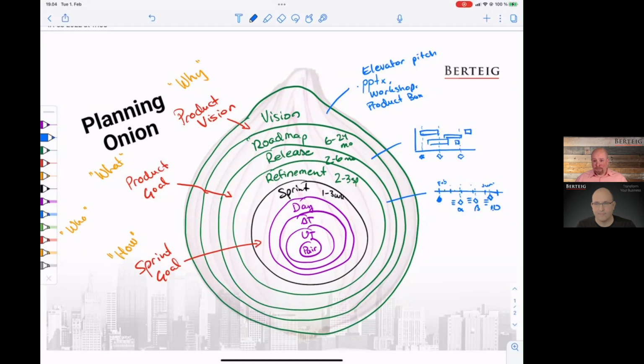So you can do the basic math. 6 weeks to go, 6 main features to put in the system. How much time do we have for each of the features? If any one of those 6 takes longer than a week, then we know that's not a sustainable pattern. So the first one that we tackled was search.